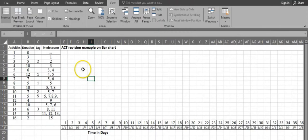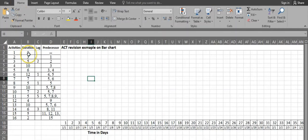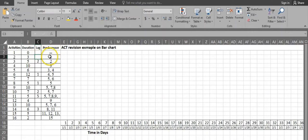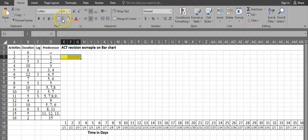Let's start with the first activity. Activity 1 has a duration of zero and no predecessor relationship — it is a dummy activity, so we don't assign any time to it. Activity 2 has a duration of 3 days, no lag, and predecessor is activity 1, so we can start from day 1. It requires 3 days: 1, 2, 3.